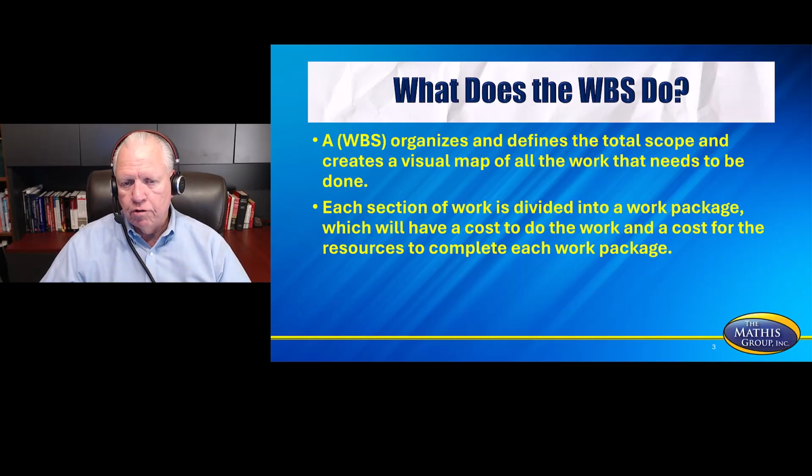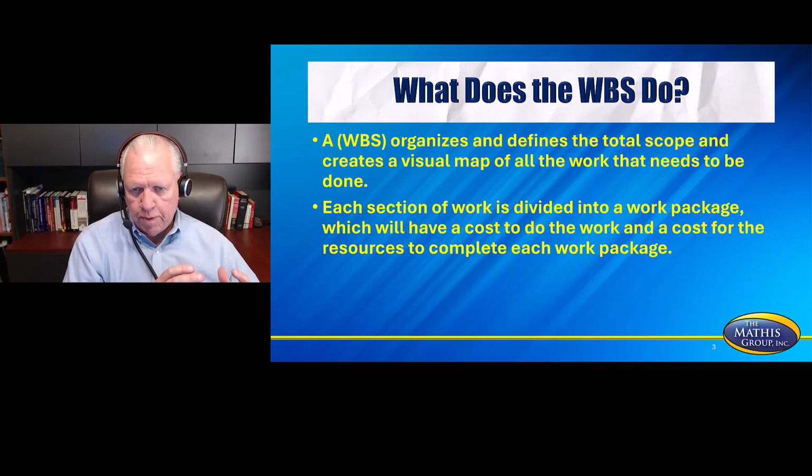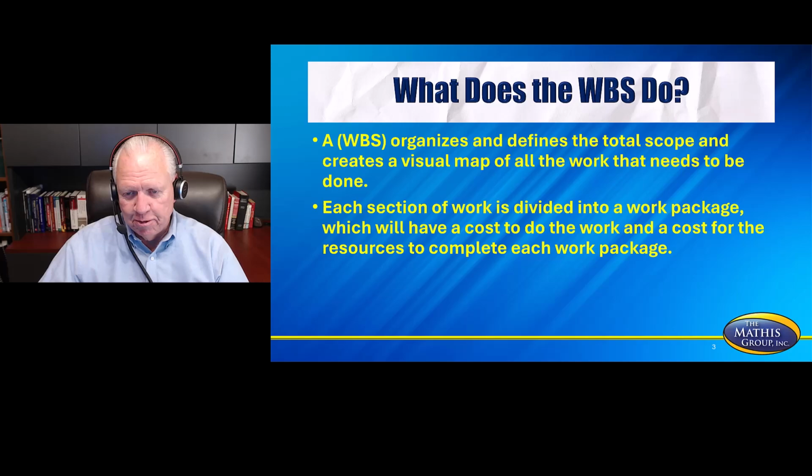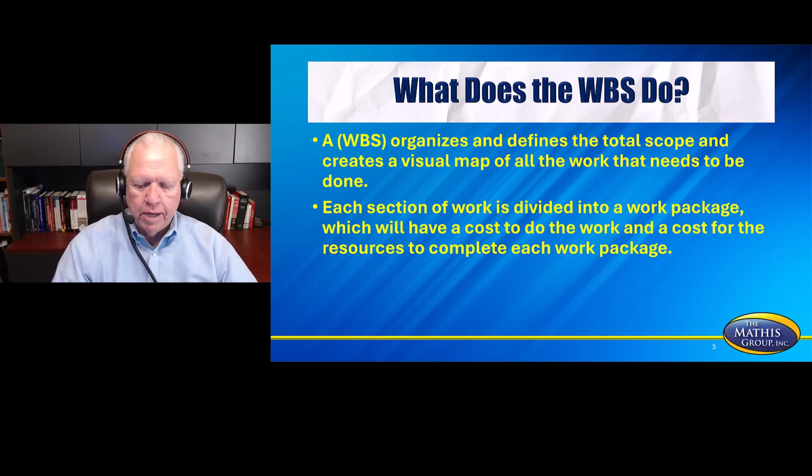Now, it's not the lowest level in a project. I can take my work packages and break them down into activities, and that's the world that we live in most of the time, in that activity world. But the lowest level of the WBS is going to be the work package level.